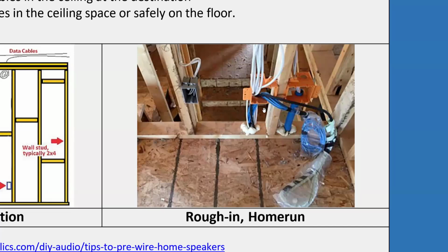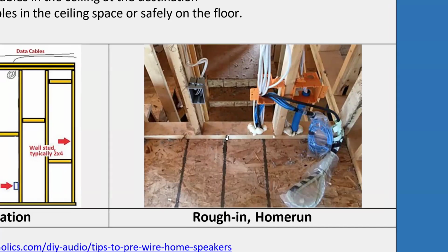Now, what else? I took some extra steps. You gotta foresee things. I can see that this construction is in kind of a raw stage at this point. What does that mean? It means that once I pull the wires, I leave. I just don't stay here. I do other jobs, and then I wait for this site to be ready for me to come back. Right? So I'm not just going to run the wires and lay them on the floor, because they will be destroyed.